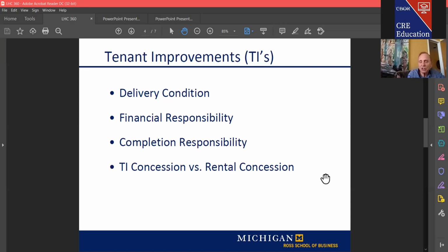Industrial side, there's very little money funded by the landlord, and it's similar in shopping centers at this point. For the most part, these retailers cover all of their costs inside the space. Completion responsibility, that's a legal issue, I guess, to get that done at a certain date. I always tell people doing any building in the fall, you better be concerned because you've got those holidays at the end of the year. What are those holidays? It's Thanksgiving, and there's Christmas, Hanukkah, New Year's, and there's another one. It's called hunting season. You can lose a month at the end of the year.